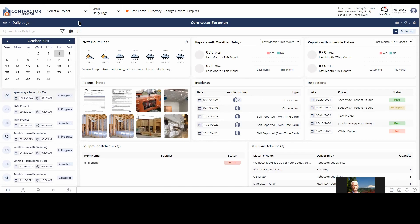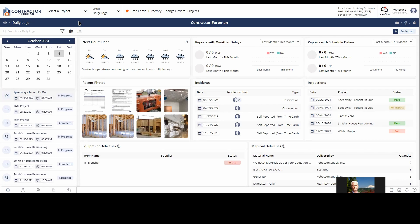Even if you're not on the job, do a daily log and just say not on job today. These are documents, they're actually legal documents that you never need to pull one up necessarily from a week ago. When you have to pull up old daily logs, it's when something's gone wrong and there's a problem, you know, windows started leaking or somebody said they were hurt on a job from a year ago, year and a half ago.